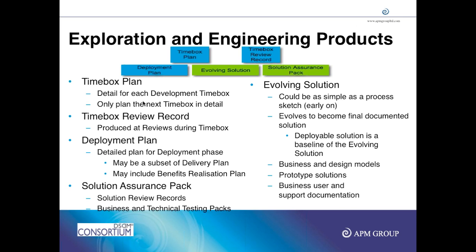Solution assurance pack also involves the user acceptance test plan, test strategies, test cases, test results. So when system testing is done or integration testing is done or user acceptance testing is completed, you have your test packs, like number of test cases or some scenarios to be tested, and then you also have your defect log, or a few people call it triage, or the UAT defect log or system test defect log. All of these come under solution assurance pack. You can call them your own names.